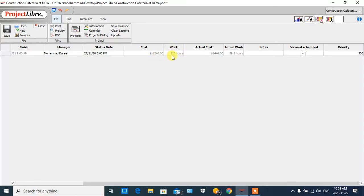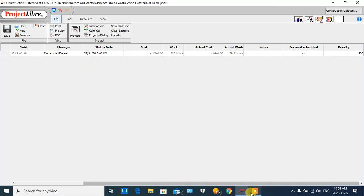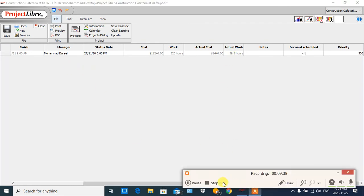The status date is also shown, and the total cost for the project is $11,240. The total work hours for all of the project is 520 hours. The actual cost spent up to now is $1,440 and the actual work hours up to now is approximately 60 hours. Thank you very much for your attention.